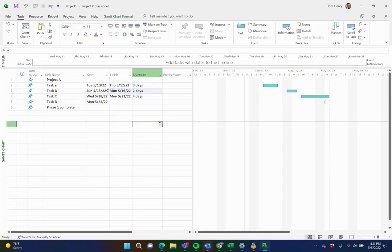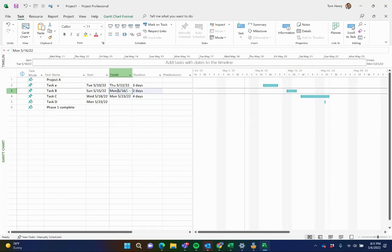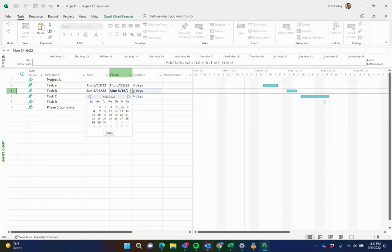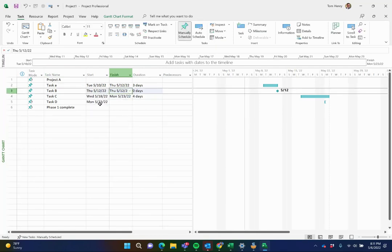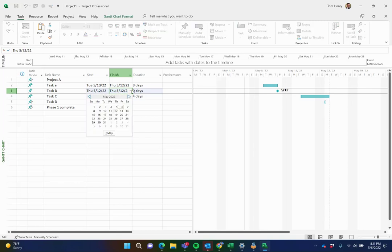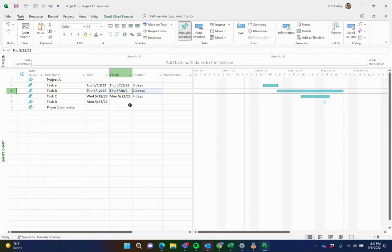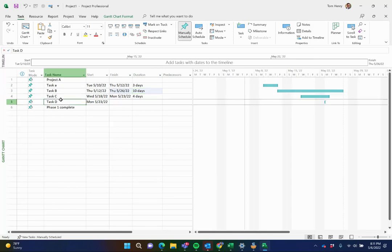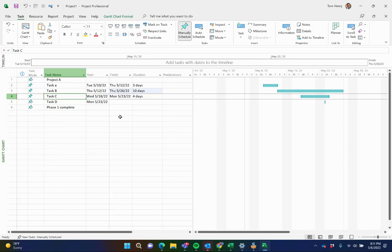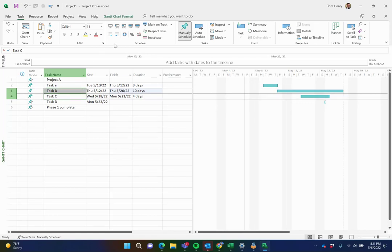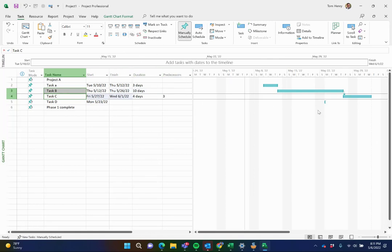Now, if these dates change, right now we're in manual mode. So if I say this one's actually going to push out a couple of extra days, a week later. Oh sorry, I did a wrong date there. A couple of weeks. We know it's going to be 10 days. Nothing else is affected. I don't want it to change my task C or anything like that. You can see on the timeline how things are changing. Now you can, down the line, say B is going to be linked to C, and link the two together.